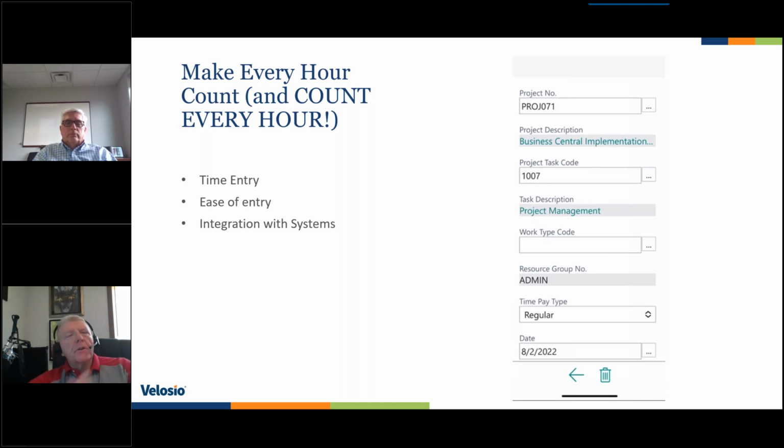If you're only doing your timesheets on Friday at 3, you've forgotten how many of those interactions, 6, 8. If there's 2 a day, you forgot 8. And that's, do the math, that's 4 hours of billing that you could have jumped onto. It could also be 16. It could be all kinds of things. So time entry being easy and efficient is very, very key.